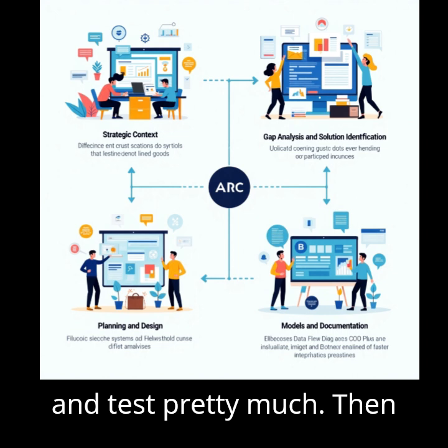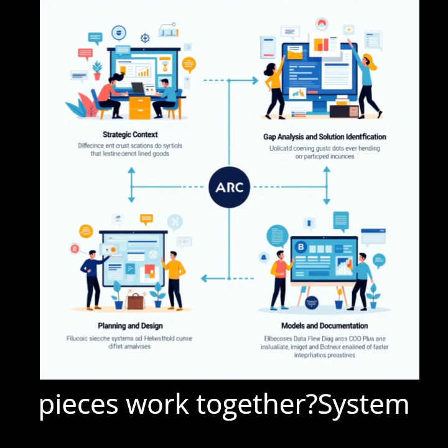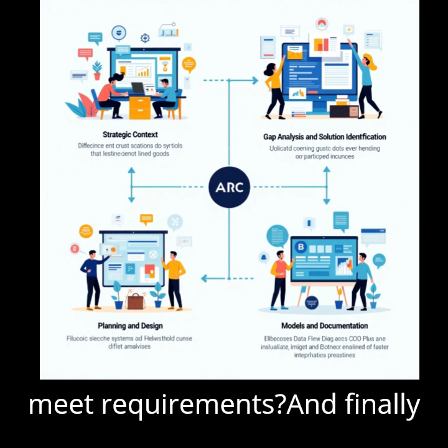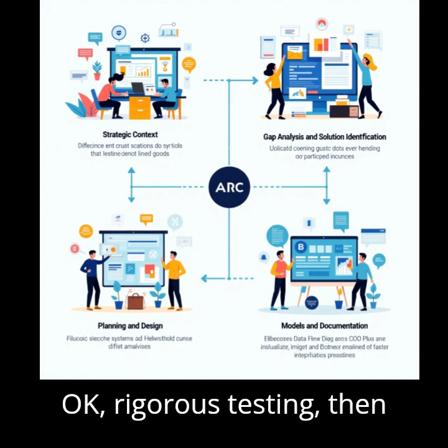Pretty much. Then comes the more formal testing phase. This includes integration testing, do the pieces work together, system testing, does the whole thing meet requirements, and finally acceptance testing, do the users or clients accept it? Okay, rigorous testing. Then deployment.